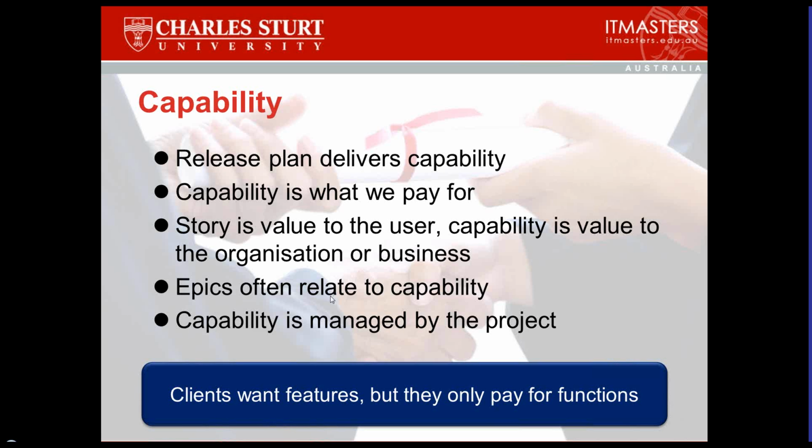Sure. Does the 2 weeks iteration include speculate, explore, and adapt, or can speculate alone be the two? It includes all three because each iteration you have to decide what you're going to do, and then decide whether or not that was the right thing to do. And if you skip the adapt phase, then you effectively don't have a feedback loop. And if you don't have a feedback loop, then you don't have any influence or guiding on what you're doing.